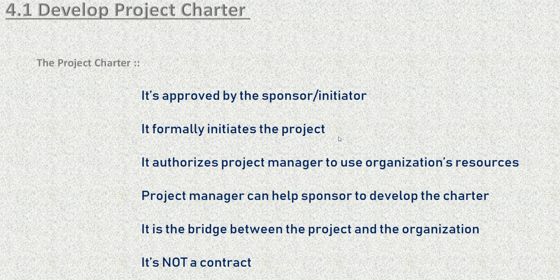Then the second point, which is an important point here: it formally initiates the project. It means the project charter. Now this is a very concrete rule, a thumb rule: until the project manager has an approved charter in hand, the project is not formally initiated.